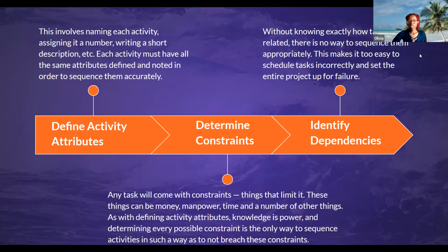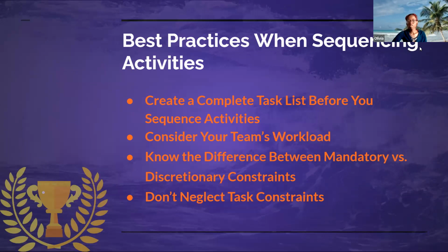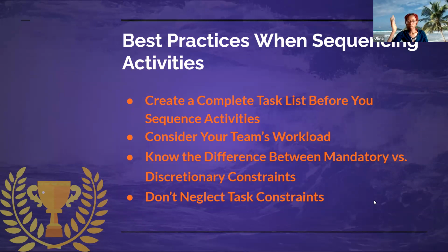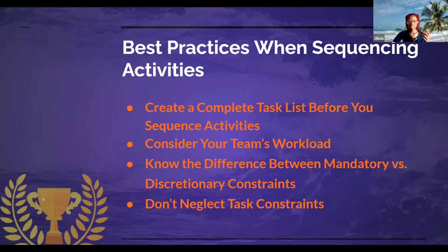So some of the best practices when it comes to sequencing activities are creating a complete task list before you sequence activities, considering your team's load, knowing the difference between mandatory and discretionary constraints, and not neglecting constraints as well.